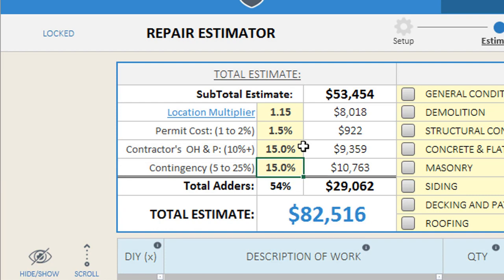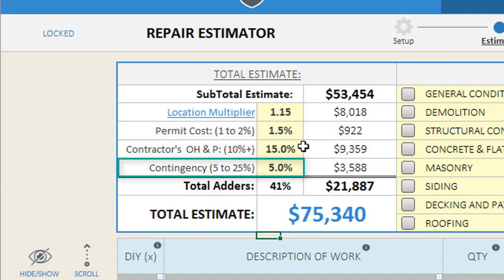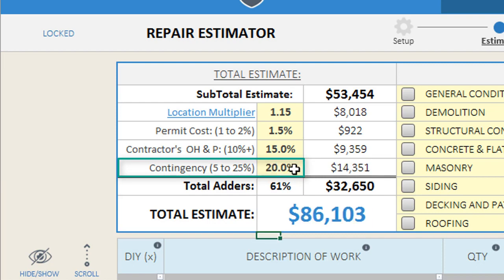The final adders option is for estimating contingency, which you can use to cover estimating errors or omissions and any unforeseen conditions on the project that can result in change orders or cost overages. If you have experience estimating costs and rehabbing houses and have put together a detailed scope of work, you may be comfortable with as little as five percent contingency. However, if you have little to no construction experience or haven't even seen the condition of the property, you will likely need a much larger contingency to cover estimating omissions, errors, and any unforeseen conditions.